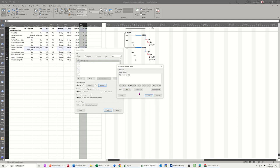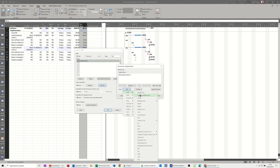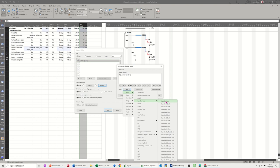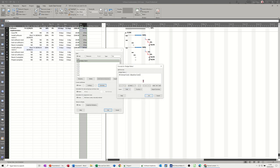So if actual costs, which is the current spend, is greater than the planned costs, which is the baseline cost, baseline costs, the first one. There's obviously 11 baselines, but just the first one. If that's true...